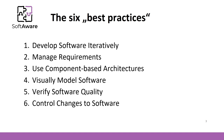The last best practice is control changes to software. Authors believe that without explicit control, parallel development degrades to chaos. Control means decomposing the architecture into subsystems, establishing secure workspaces for each team, and establishing an enforceable change control mechanism.